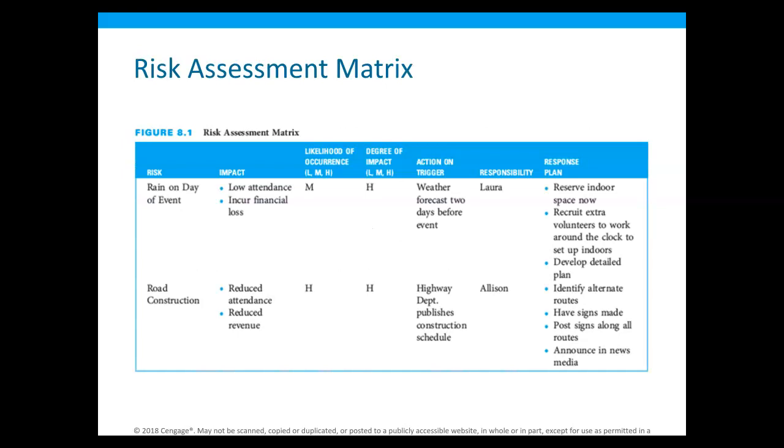So we come up with an idea. Here's that idea on a risk assessment. Here's actually one for the wedding that we talked about earlier. Rain on the day of an event. Well, what is its impact? Low attendance, financial loss.